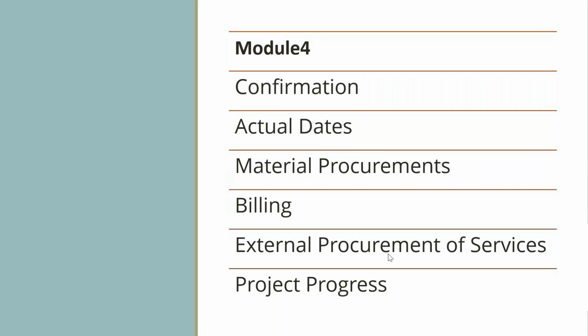In order to plan materials and costs, we have certain tools. As we have SAP, which is integrated with all of the modules, there are separate tools. Primavera is one of the major ones, used to do the scheduling for big projects. If you have around 10,000 line items, or 5,000 line items, that becomes very cumbersome to do in SAP. So Primavera has been used industrially for a long time, and it integrates with SAP.